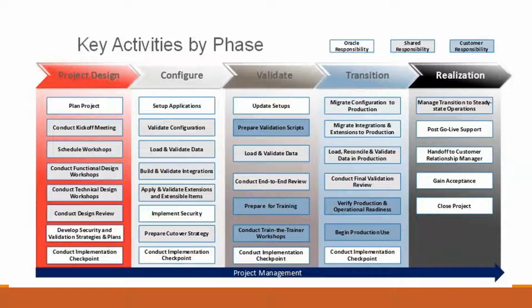We need to tell the vendor, if it is the iPortal, to please not enter any invoices from December 29 to 31st, because we are upgrading the system. So there should be a proper cutover strategy.